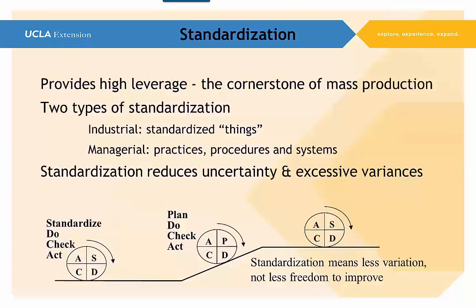When we talk about standardization, the point I want to make is that if we can specify something that's already a standard in industry, we have an opportunity to get down to a very reasonable competitive pricing, and we also have an opportunity to get the most vendors involved, which guarantees a pretty competitive pricing and a decent selection so we can select a good vendor to provide us with whatever we're doing.